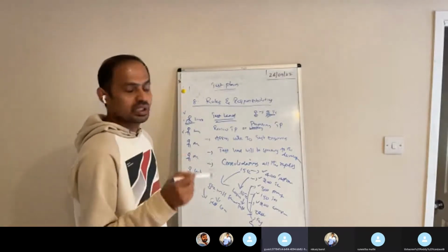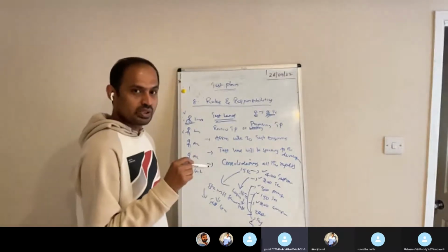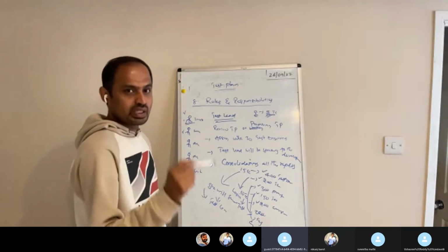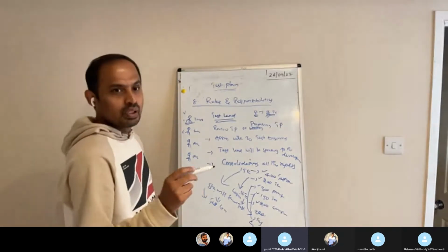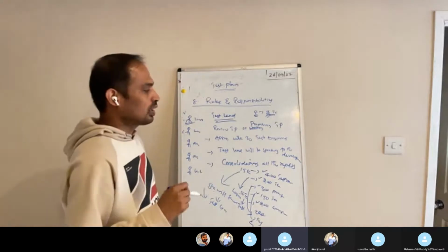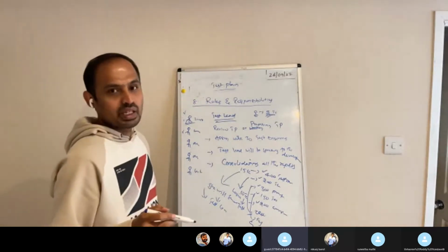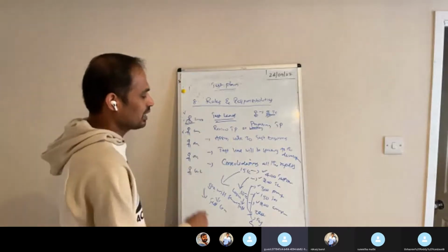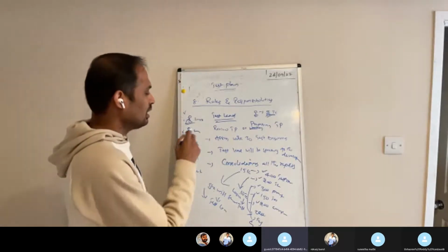In the test reports, they will mention the number of test cases executed, passed, failed, and pending, the total count, and the total percentage completed. They send individual reports to the test lead.